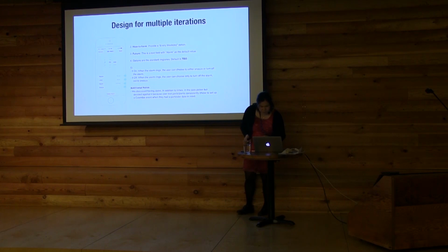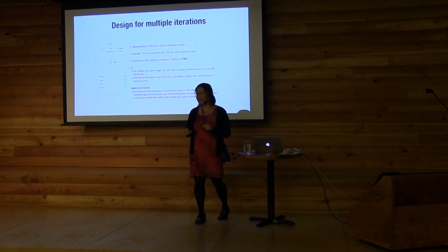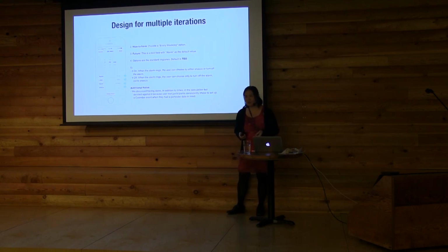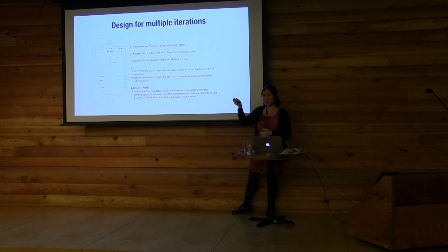To say, what are we implementing now? What are we implementing in this imminent sprint versus what are we going to prioritize in a future sprint? And then you'll have your user stories written to reference your design deliverable, whatever form that takes, and your acceptance criteria will generally reference that.